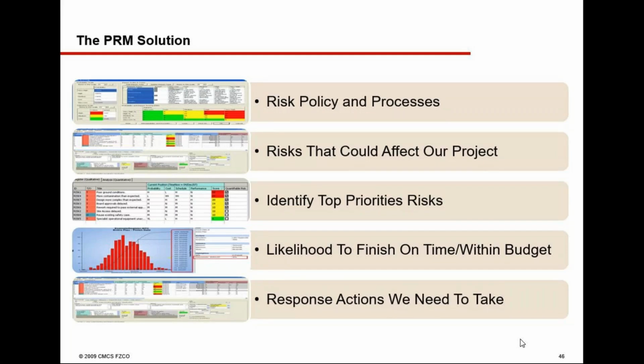For example, no activity should be more than 21 days, right? Let's say you have an activity for 180 days, it's wrong. You have to break it down into different activities of 21 days, and then give the relationships and maintain it within that 21 days.